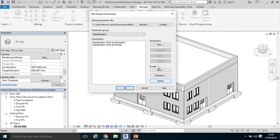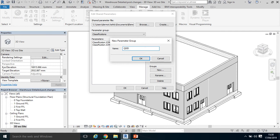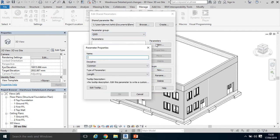This time I'm going to set up a new group called QS ID—or it could be called Quantity Surveying work breakdown structure—and click OK. Now we have our QS ID group name. We're going to set up a couple of shared parameters within this group. Let's call the first one National Standard Building Elements, the Irish breakdown structure.